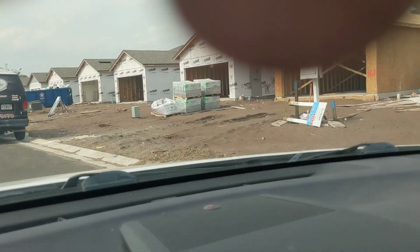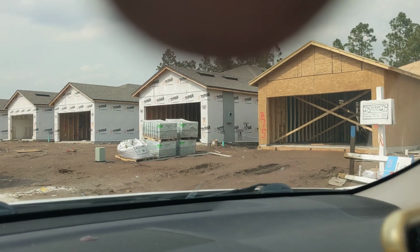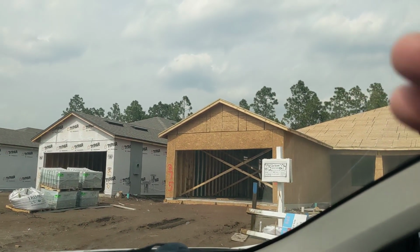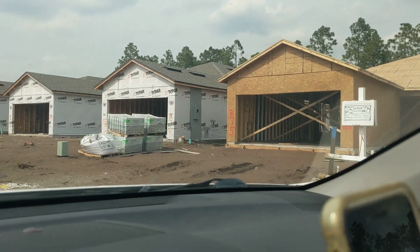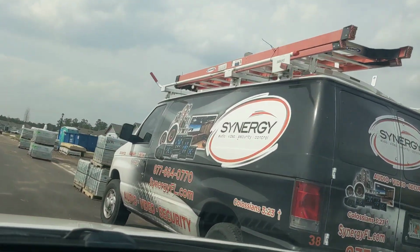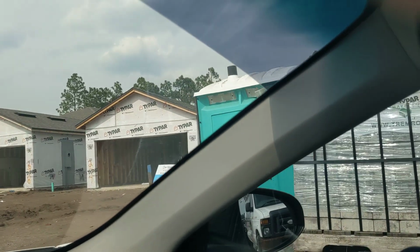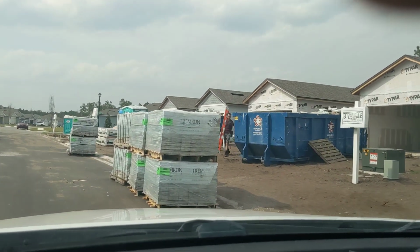276, 277. Waiting for some sliders to get installed, but going to go for frame and all rough inspections over here. Although with the minor inspection today, because my roof's in, the inspector gave me permission to go forward and insulate the building. That is nice. 278, 279, we continue with the messy job of drywall. Messy. And so we're going to be getting texture early next week there.